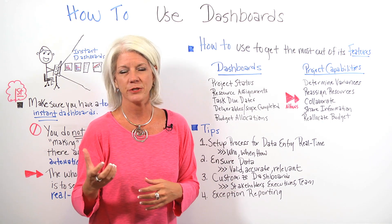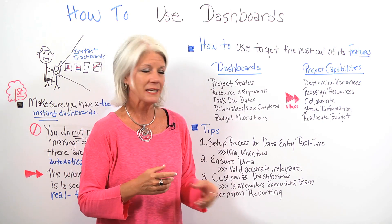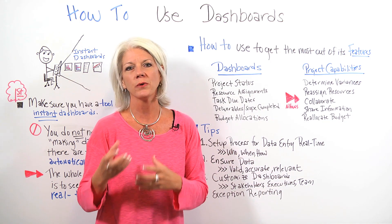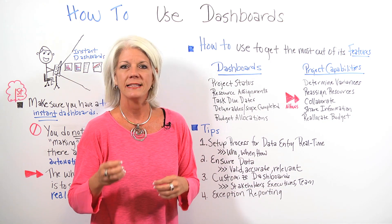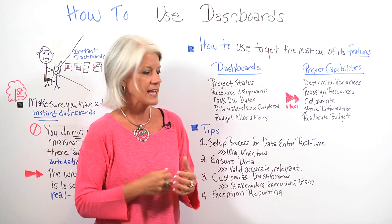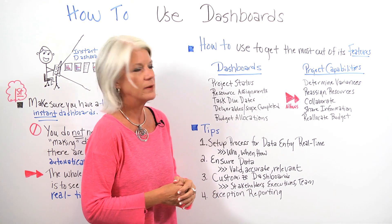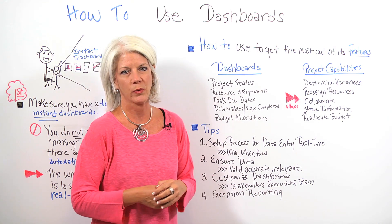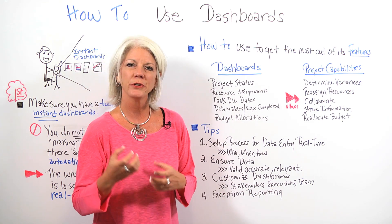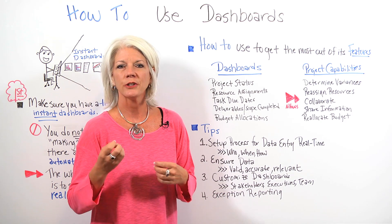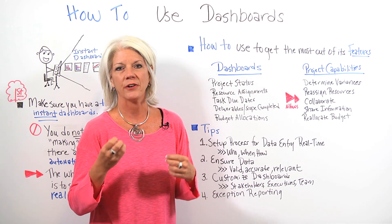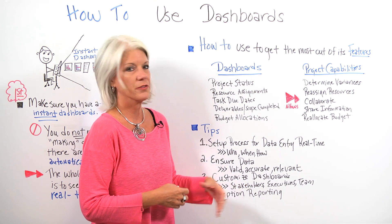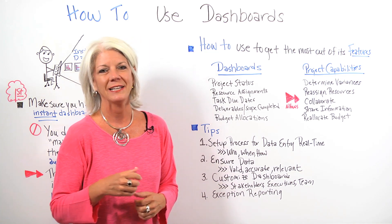Project team members are going to want more details and will only be interested in the tasks that they have due. Also, a big tip is exception reporting — when you look at your dashboards, focus on things that are not being completed so you can get those back on track.